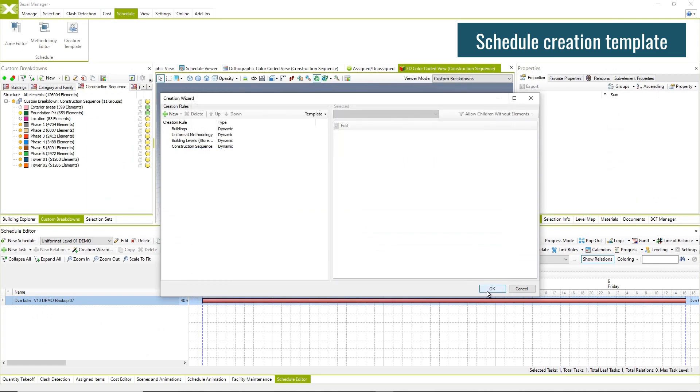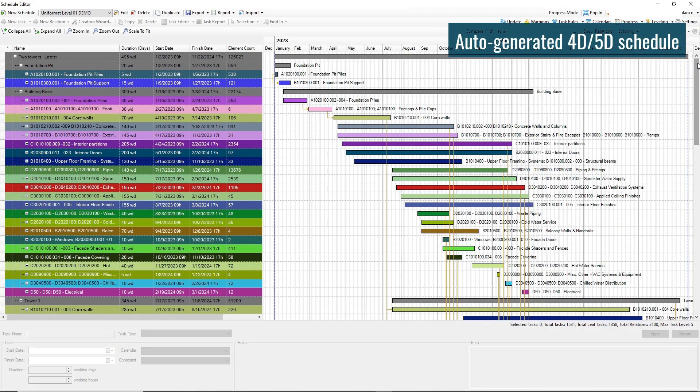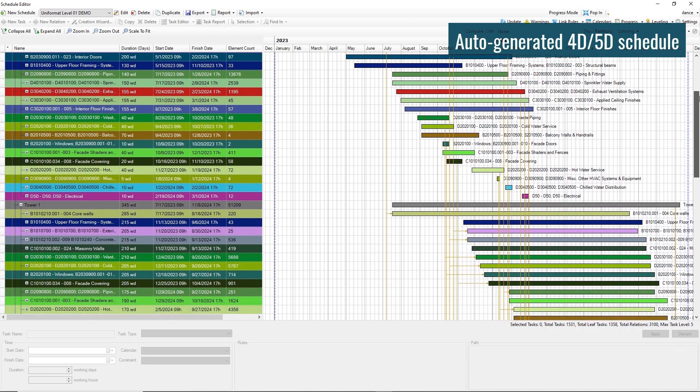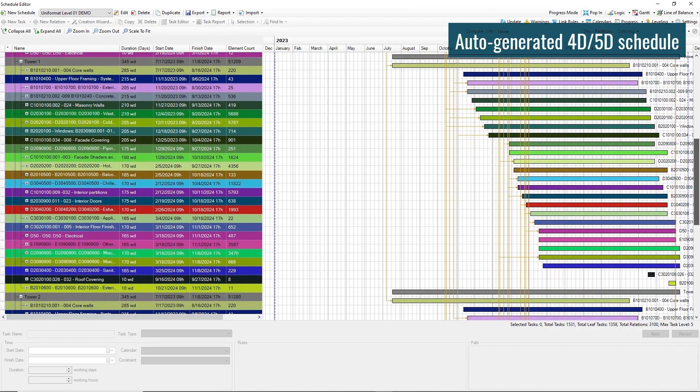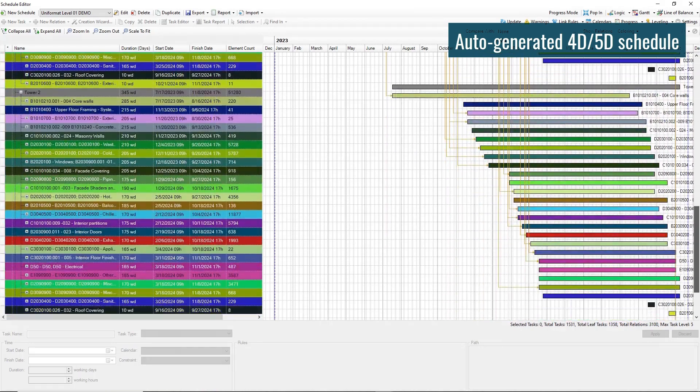Combine zones and methodologies within the creation template and generate an initial schedule with all tasks and relations.